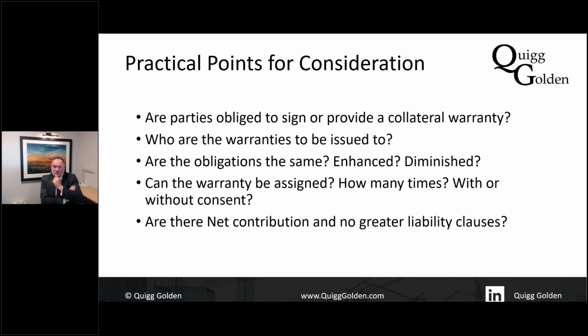Are the obligations the same? Well, they should be, and they certainly should not be enhanced. So it's very important that you have a no greater liability clause written into the warranty. Can they be assigned? Yes, they can be assigned as many times as they like, unless there's some restriction on the assignment, such as how many times it can be assigned, with or without consent.